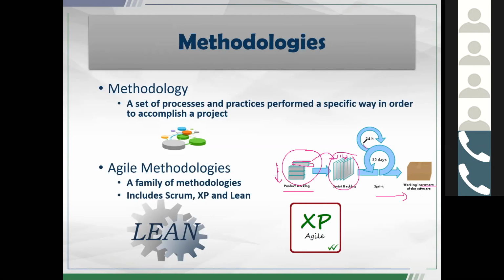And every day we're also doing a quick little stand-up. It's called the daily Scrum or the daily stand-up, depending on the methodology used, where we do a quick touch base every single day, typically in the morning before we start our day. We answer 3 questions. A, what did we do yesterday? B, what are we intending to do today? And C, what obstacles are we encountering?